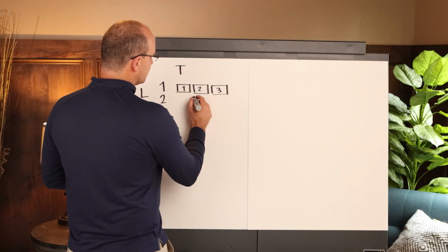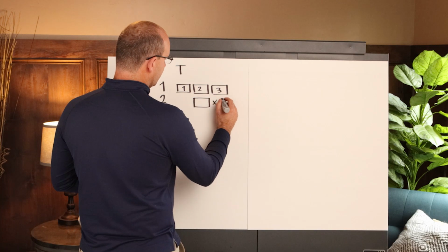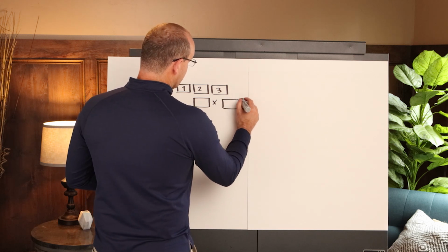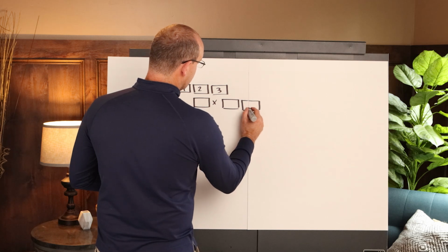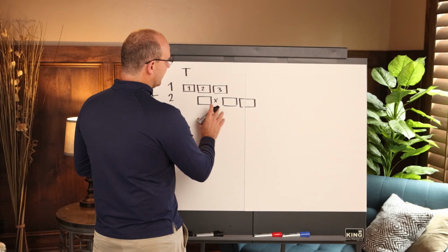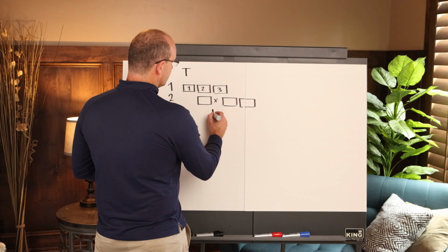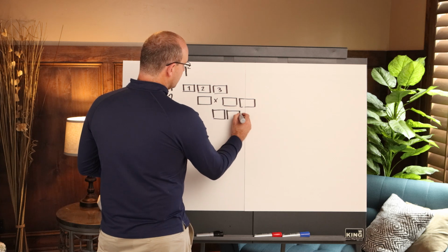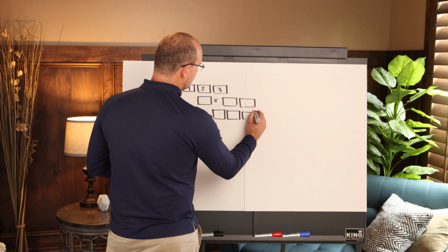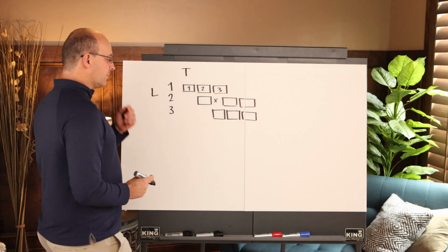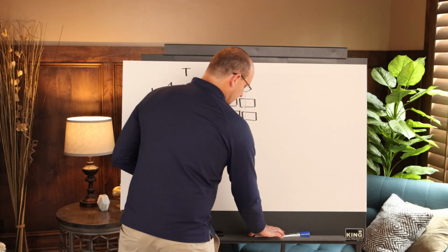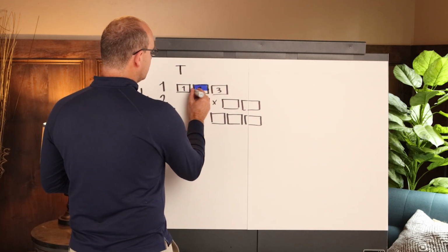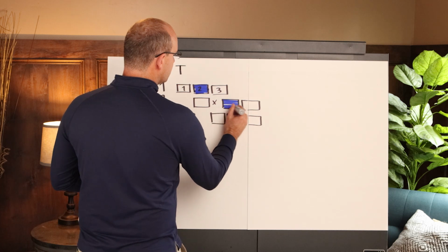Let's say that in the course of work, there was a delay right over here. And wagon number 2 delayed, which is also going to extend wagon number 3 as well. But let's say that instead of cascading that delay, you thought, like most construction managers, hey, what I'll just do is I'll just stack this work on top of itself, and it's not going to be a big deal. We're probably going to be able to do that work. So if I color that, actually I'll color it with blue. Let's say that this second trade, this was the blue wagon, and this is the blue, okay?